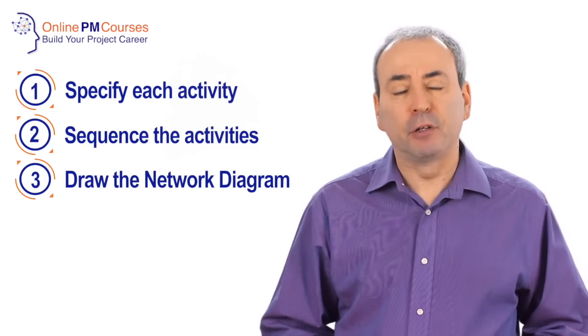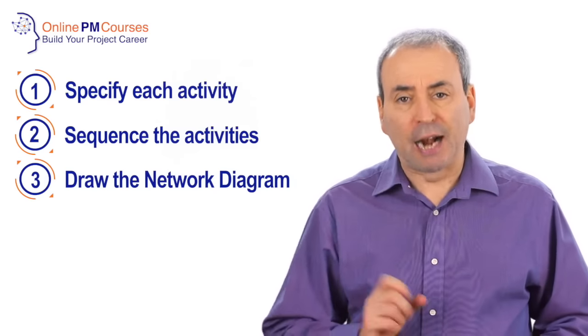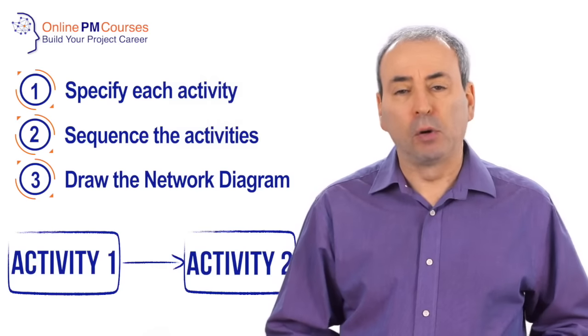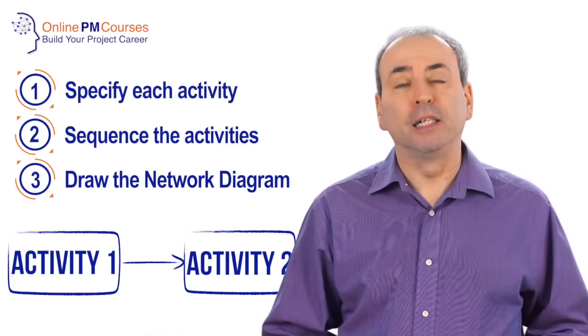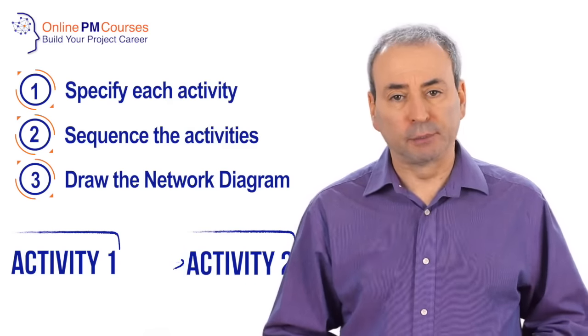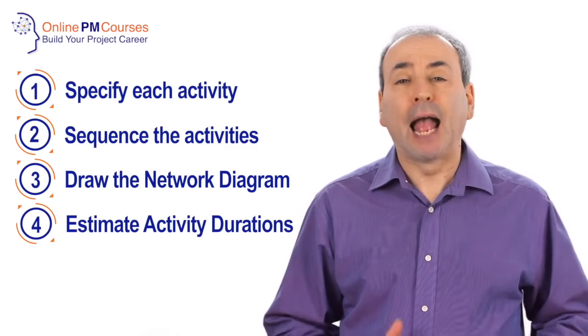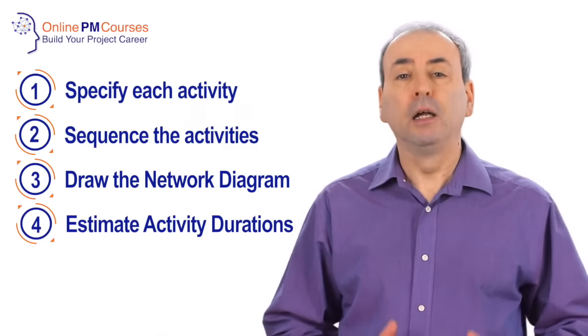This is a graphical representation that uses arrows to connect the activities which are shown as boxes. And in the boxes, we can record the information that is important to us. The next step, Step 4, is to estimate how long each activity will take, the durations.